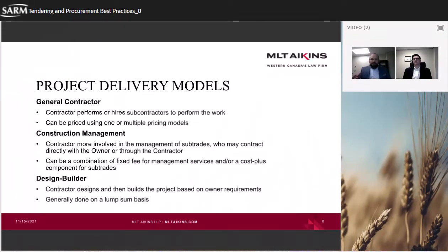And really what this engagement in this relationship is this notion that we engage this contractor and they're going to be responsible for both the supervision and execution of the work. In most circumstances, the general contractor is going to have their own employees swinging hammers, drilling screws and things of this nature, and actually self-performing portions of the work, as well as potentially subcontracting as needed. In any event, they're going to be responsible for the budget, the workmanship, the schedule, and the overall quality of the work here. And so this is kind of the normal course.